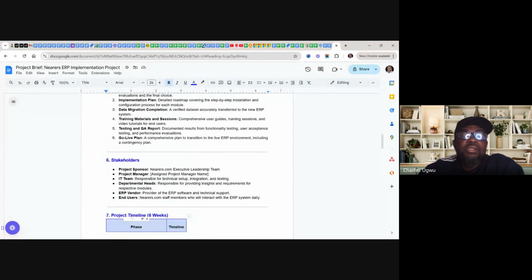And then stakeholders, look at stakeholders here. The stakeholders will be made up of the project sponsor, Nearers.com executive leadership team, project manager, the assigned project manager, and the IT team comprised of the project team members, such as the business analyst, quality assurance managers, developers. These are the IT team that will be responsible for technical setup, integration, and testing. Departmental heads, all the departments like HR, finance, sales and marketing, inventory and operations, are going to be part of it because we are deploying this for their various use.